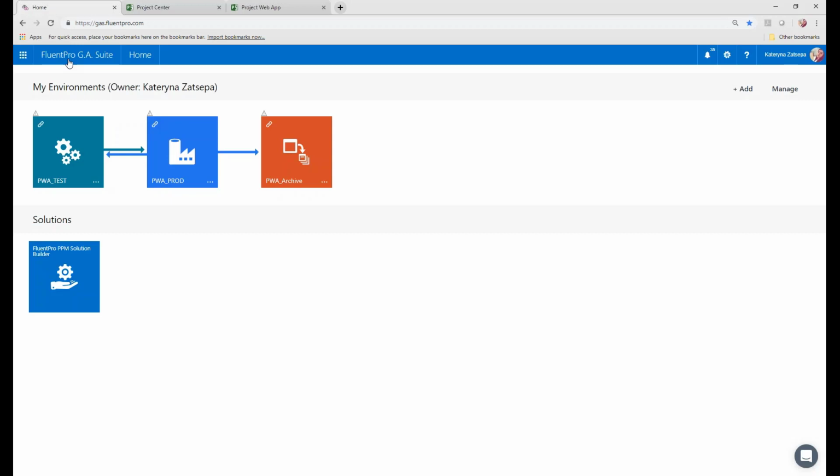And moreover, for best performance of Project Online with large numbers of projects, we need to aim to not have any project sites in the PWA site collection itself. So this is what was requested, to move project sites to a separate site collection to ensure that the Project Online performance for our environment is at its best.